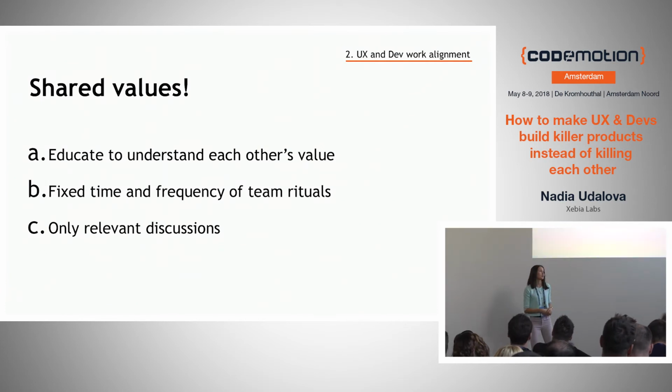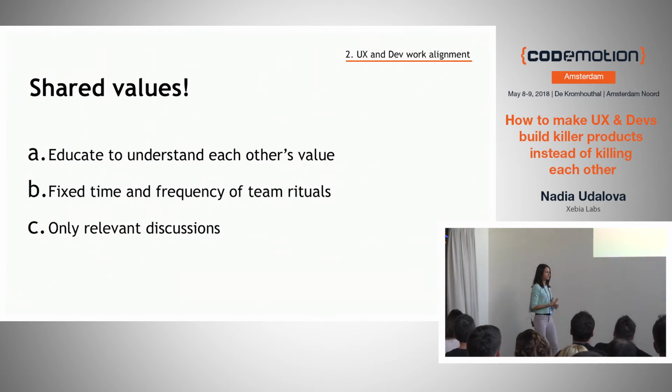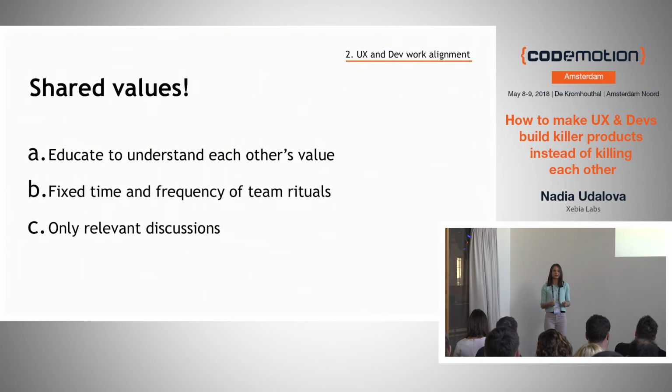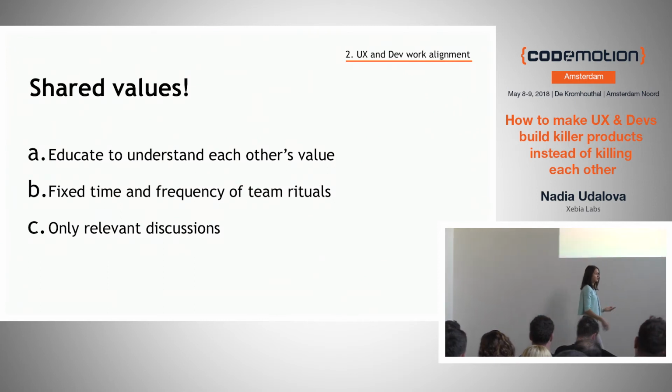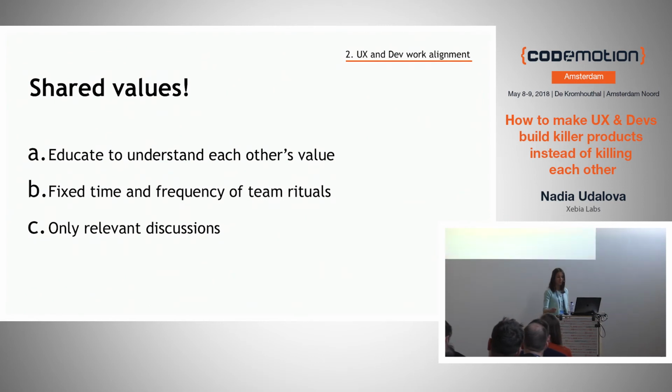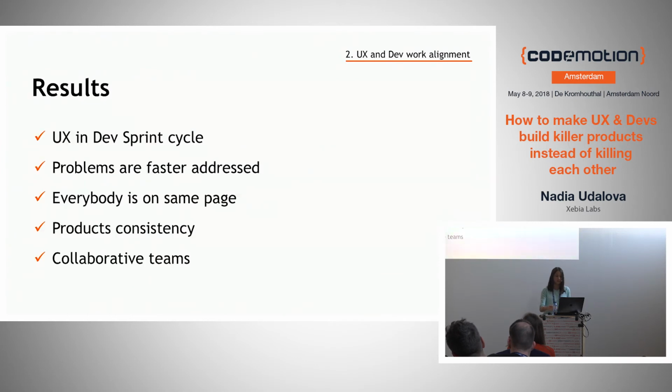development and the design. So make sure you share those values, because if you do not educate people to understand what work you are doing and why you are there, it's really hard to make people come to these rituals, right? And also, 2 simple rules. Make sure that you are discussing only related stuff at the stand-ups and only related stuff at the retrospectives. Make sure that they're time-blocked nicely, and don't go over the time period, because otherwise people will just get bored and won't attend your stand-ups.